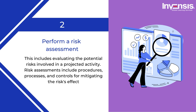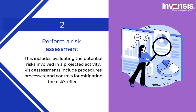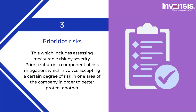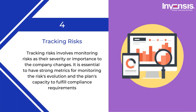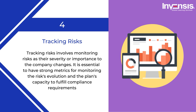Second, perform a risk assessment, which includes evaluating the potential risks involved in a projected activity. Risk assessments include procedures, processes, and controls for mitigating the risk's effect. Third, prioritize risks by assessing measurable risk by severity. Prioritization involves accepting a certain degree of risk in one area of the company to better protect another, setting an acceptable amount of risk for various areas.